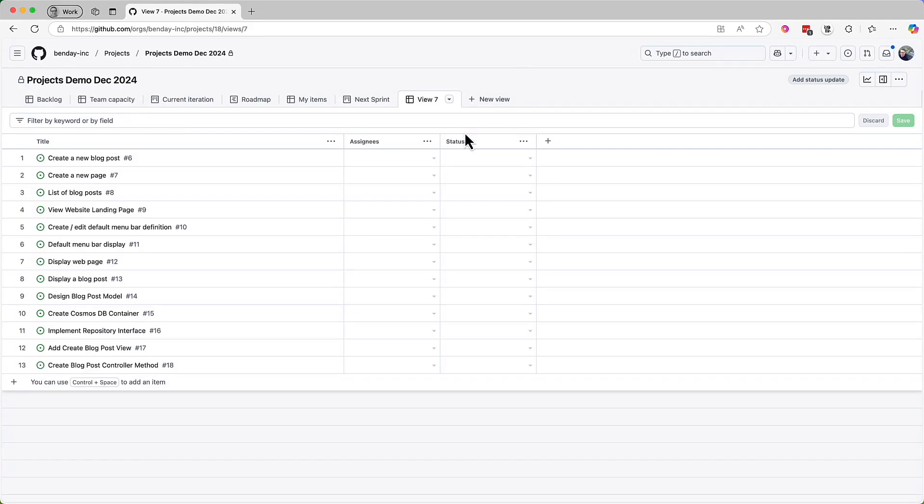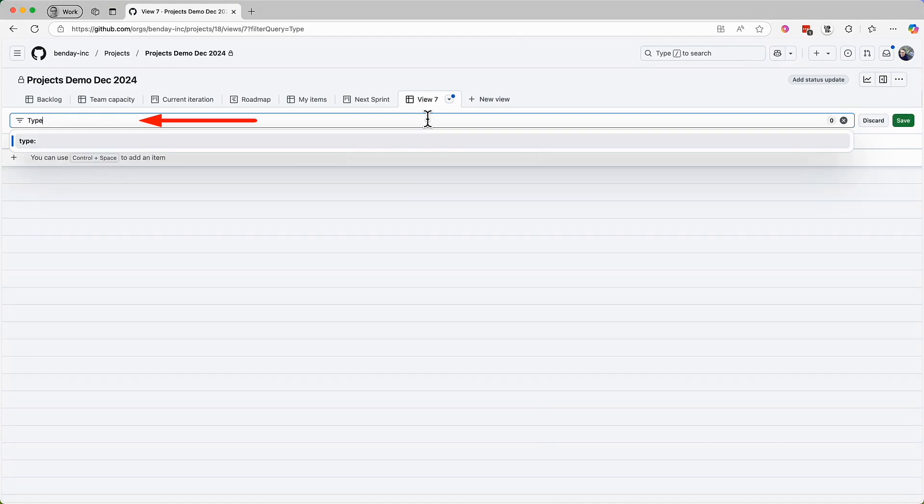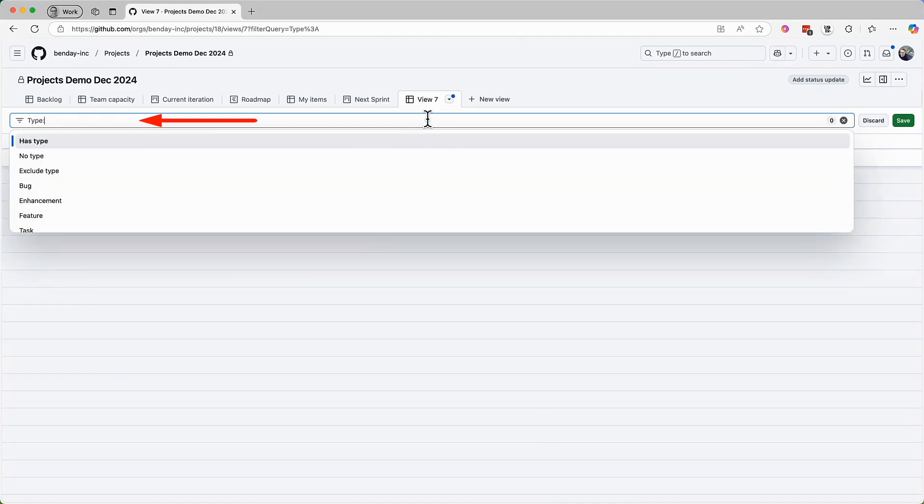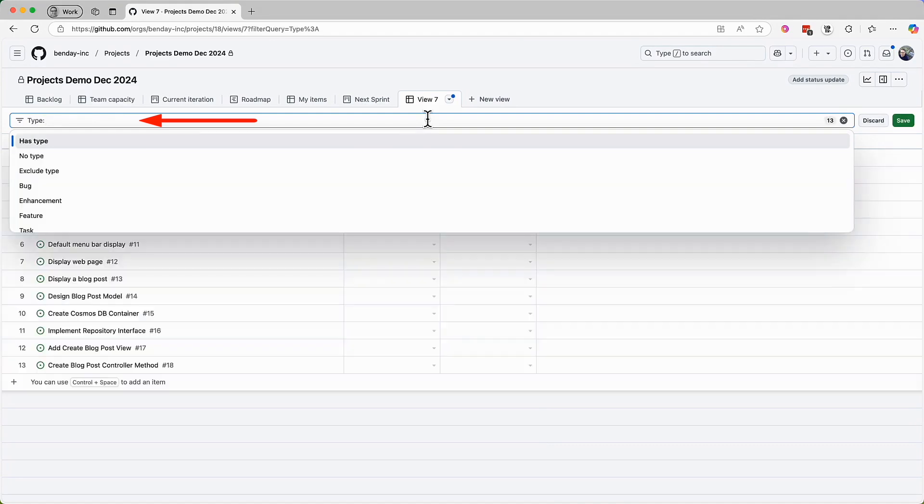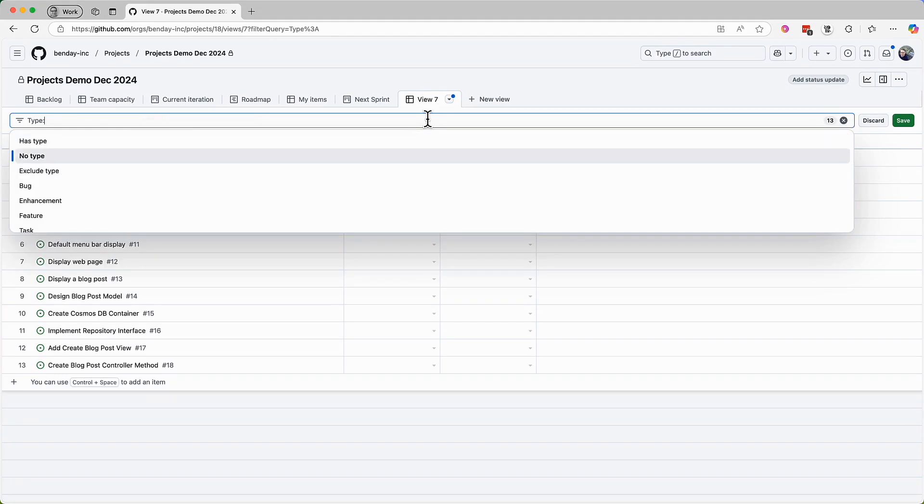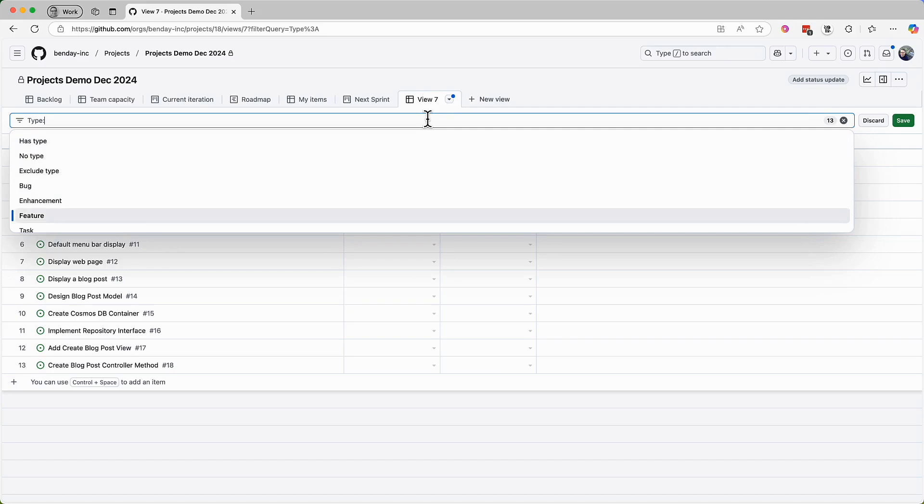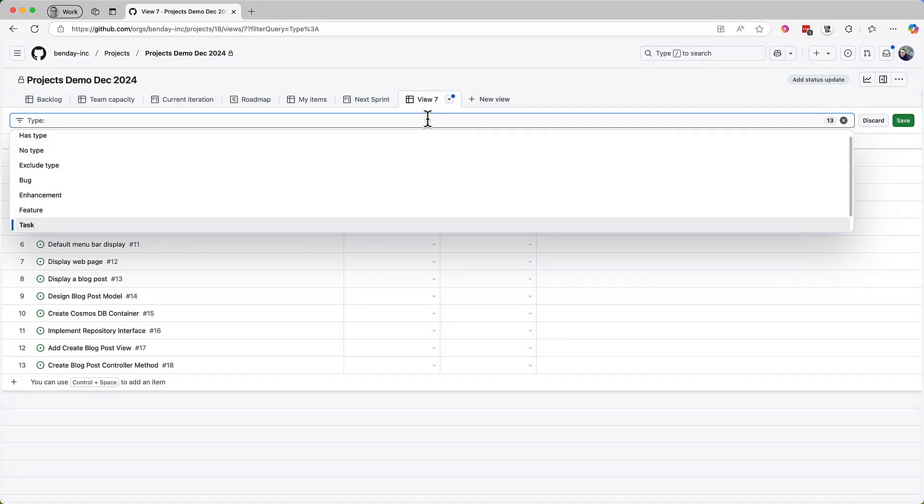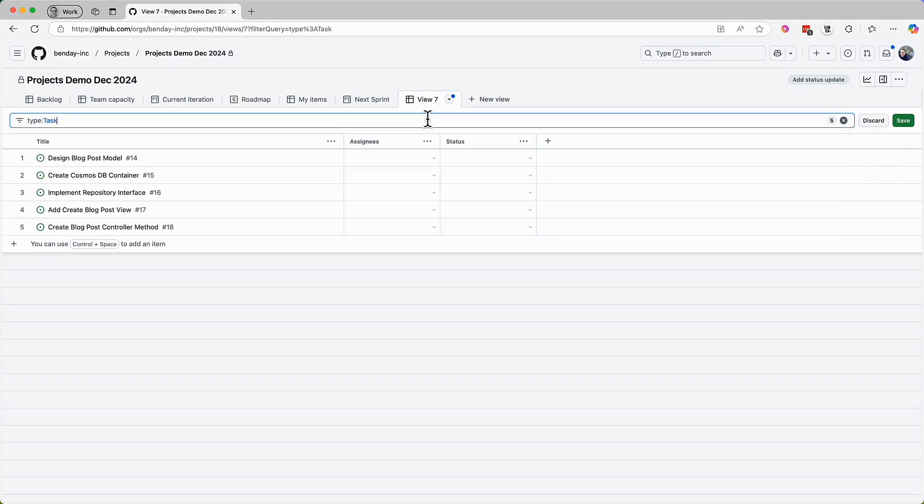The answer is to add a filter to this view. And one of the available filter types is filter on type, filter on issue type. To get this menu, you just type the word type followed by a colon. That brings up a list of available issue types. Then just scroll down, and here's the type for task. Select that filter on type equals task, and now here's our filtered list. This is a pretty good start.